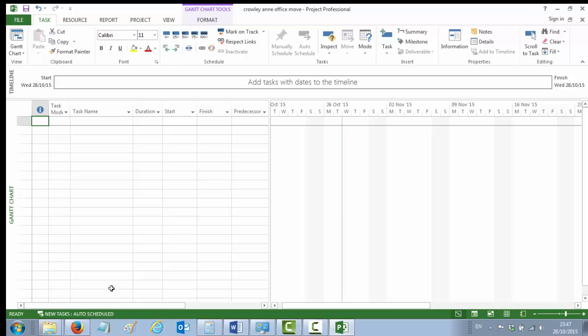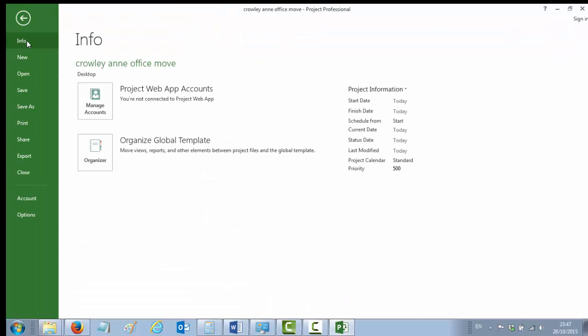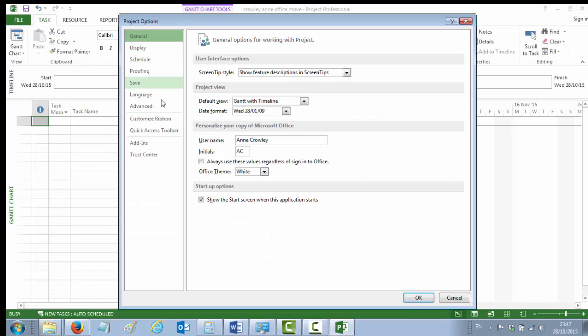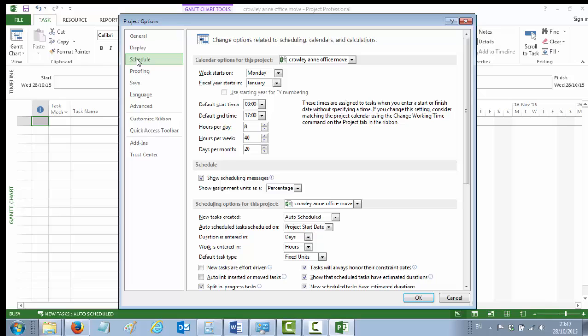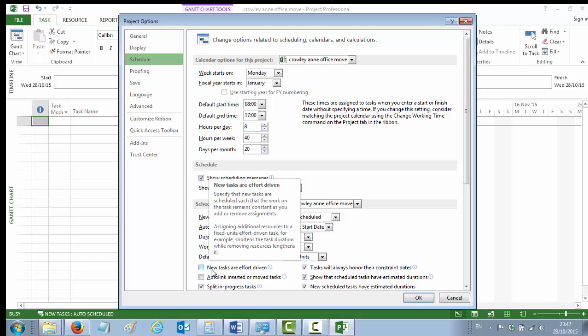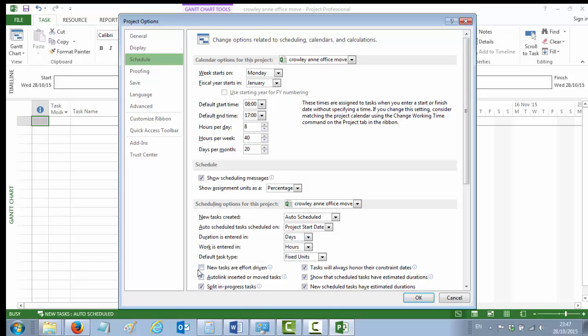The second thing you were asked to do was change the tasks to be effort-driven. To do that, you need to go to your File menu, and on the File menu, go down to the bottom option there, which is Options. In Options, you have a number of different types of options, but we're going to go to the Schedule options, which is the third one down here on the left-hand side. You've got a lot of schedule options, but on the first screen, towards the bottom of the first screen without scrolling down, you'll see a tick box here that says 'new tasks are effort-driven'. You need to tick that box.